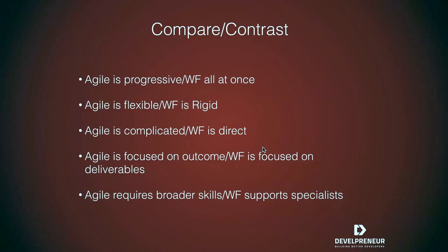So maybe at the end of the design phase, you have some additional requirements, and you say, okay, we're not going to run through requirements and design again, but we are going to put together an addendum which basically says, hey, here's an additional requirement, here's a little bit of design work we did, and then we can move into implementation. Theoretically, then there's no other changes to anything until you're done with implementation. And the next time you'd be able to make any adjustments would be in the testing phase. That's pretty rigid.